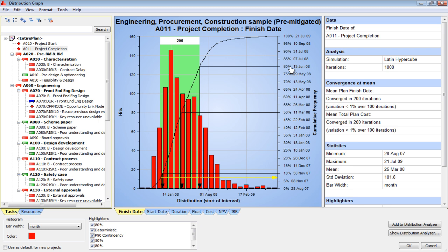Projects where they're simpler and we can do more things on the fly to correct, more routine type of projects, maybe we need a lower confidence level because we're good at sequencing on the fly. So I'm going to take an 80% confidence level and say, if you want to be 80% confident, our 80% confidence date is June 13th.